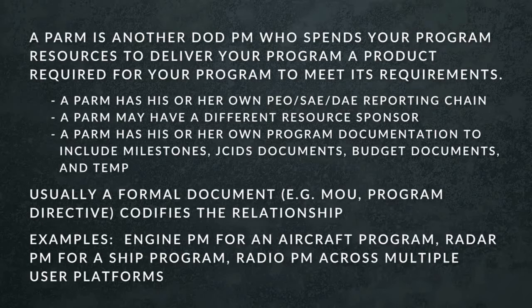So what is a PARM? If you're a program manager, a DoD major program manager, a PARM is another DoD program manager who's going to spend your program resources to deliver your program or product that you require to meet your requirements. That PARM is going to have their own PEO, service acquisition executive, defense acquisition executive reporting chain, depending on their acquisition category. A PARM might very well have a different resource sponsor in the service staff than you.